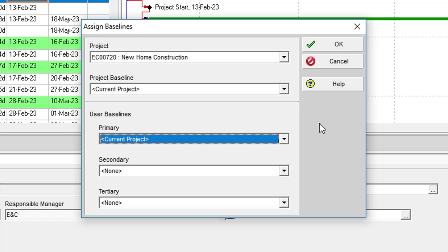This means that the current project is actually doubling as a baseline. If baseline dates, durations, or costs are being displayed in the project, they will simply match the current values of the project. Not very useful, as these will change with the project and not provide any frame of reference.